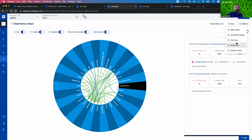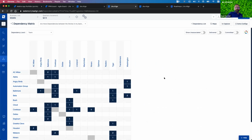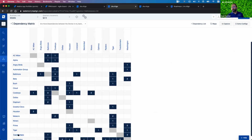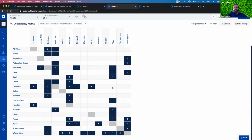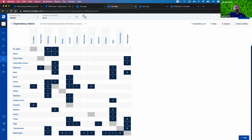Now, this means that you can also provide different levels of visibility, like the grid view, over those dependencies. And this is probably a better answer to the question that we had earlier in Advanced Roadmap, to identify over-reliance on specific teams, for example. So to the left, we have the teams that request. To the right, we have the teams that actually deliver those dependencies. And you can see that we can quickly identify specific teams that we are relying upon heavily, like this Baltimore one here, or the Tiger one, that seem to have a lot of requests coming in from other teams. On the opposite side, a team like Washington seems to be missing some critical skills or something, because they tend to rely a lot on different teams. So this is probably the type of visualization that you were talking about earlier, and that you want to have to understand how those teams relate to each other and what kind of dependencies happen there.